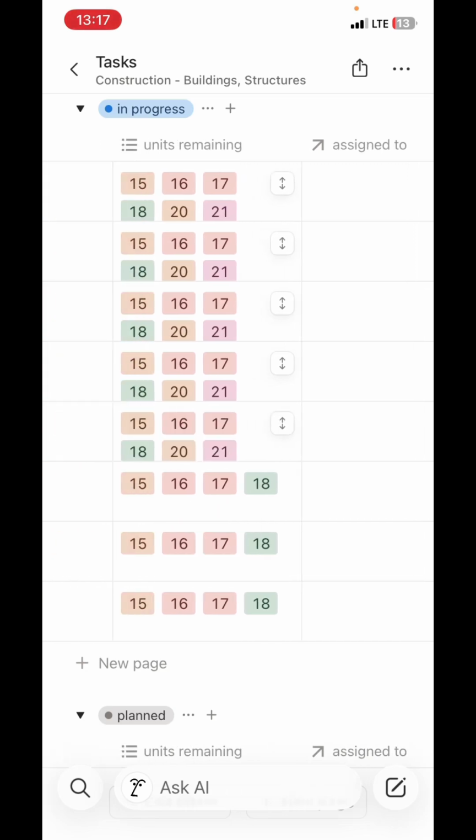If we have about 7 villas remaining and I have 1 week to finish, that will probably be about 1 villa per day, because you have 7 days in a week. Of course, there will probably be Sunday off, so that's 6. You have to find a way to account for the 7th, so that you can manage your time. You can calculate: if my time frame to finish this particular activity for this project is from now to next week, or a month from now, and you know the work days, you can start calculating what your target should be. Maybe in a week I will do 3, and you must make sure you do 3. Remember I said construction management, one aspect of it is managing time. That's how you manage your time.